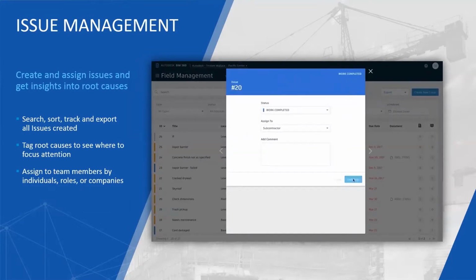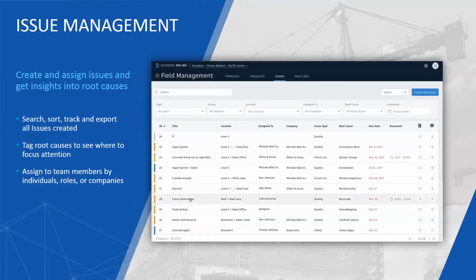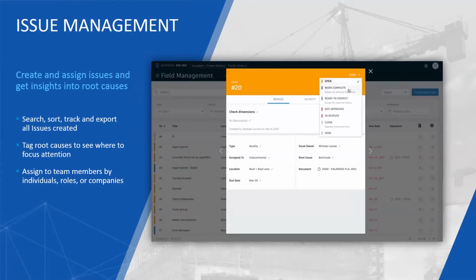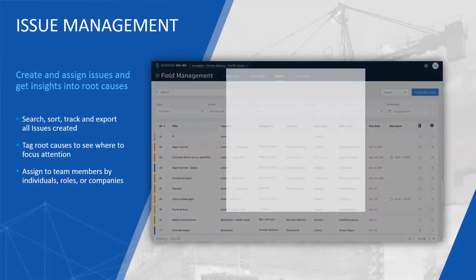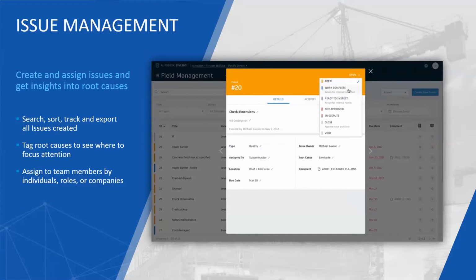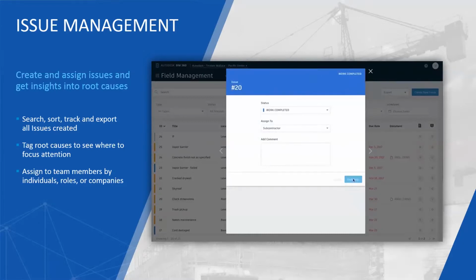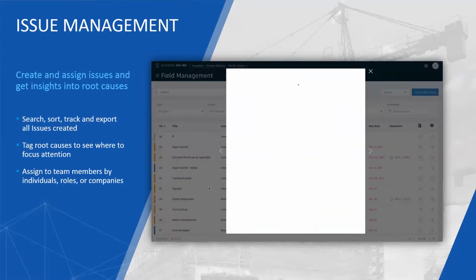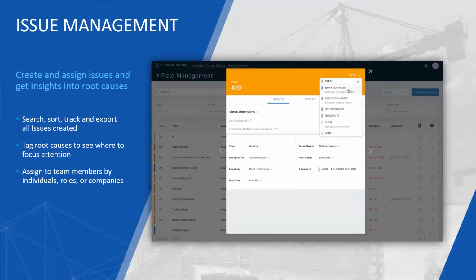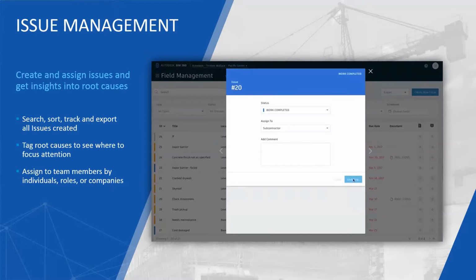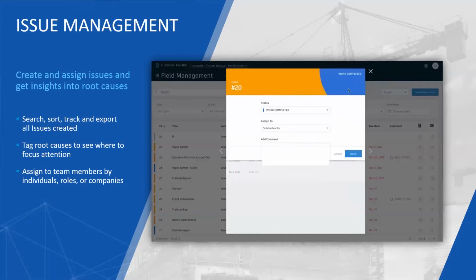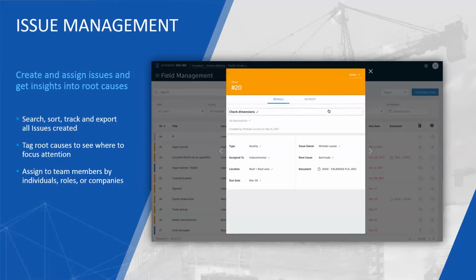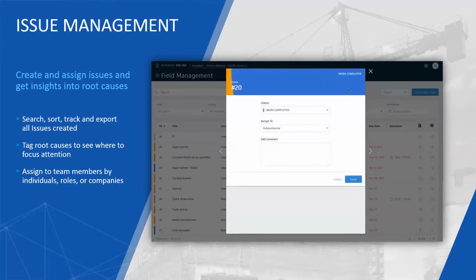Looking at managing issues on site as well. So issues are separate to RFIs, but what issues allow you to capture is any sort of design issue on site, a work issue on site, or a safety issue on site. And I suppose issue management is a key workflow during site implementation of every construction project, but disconnected issue management processes such as paper checklists or reactive management of problems can cause a series of problems. And this is, I suppose, a lack of info at the point of construction. You've no visibility into the issue resolution, and you also have increased time to find and fix problems as well.